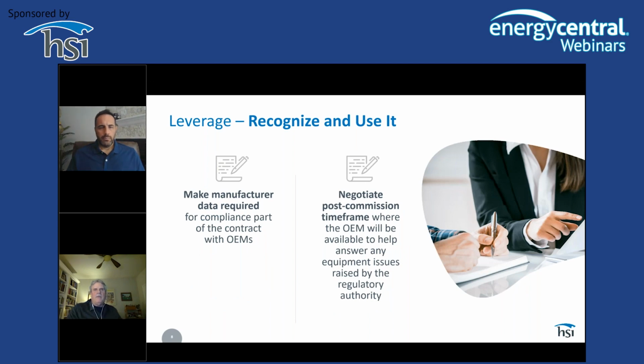Make manufacturer data required. I'm going to sign a contract with a builder. I'm going to say, you're going to include this. This is part of what I want. I'm going to buy your solar panels, or I'm going to buy your wind generators, but I'm also going to get this from you. I'm going to make this part of my contract, of my RFP, because you're going to bring this to me. I would do that if I was building a facility today.